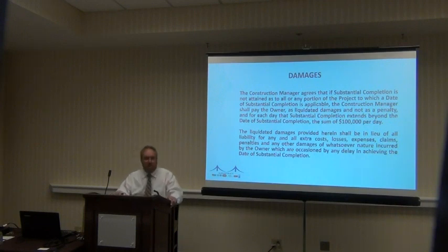Because it does depend. Okay, what does it depend on? It depends on the application of substantial completion and everything that goes with that in this case. For example, when substantial completion occurred. Plus the owner's fault for not reaching substantial completion. Okay, so it doesn't say who's at fault. It depends on how they come up with a $100,000 number and whether they can justify that as a reasonable liquidated damage. Let's hold on to that thought. Is it a reasonable liquidated damage if it's the new Vegas Stadium for $1.7 billion? Let's hold on to that thought. Okay, I like the answers that are coming out here at the end.